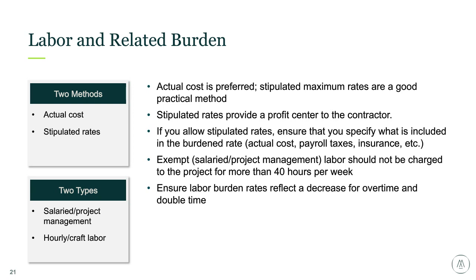However, we often see rates are more practical, but you need to make sure that they're market competitive. If there's no profit in labor, there's a higher likelihood, based off experiences, that the labor charges by the contractor will be more efficient, as this is not a profit center. That is, when we do our construction audits and labor is at actual cost, there's no markup on the labor, the job is staffed less so than when there's rates. If the rates include a markup, there's a benefit for the contractor, so the job might not be efficiently staffed.